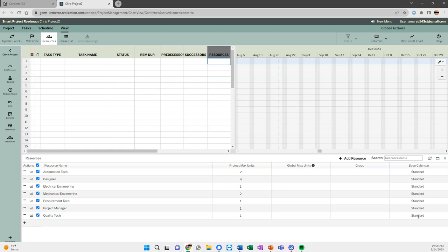There may be portions of the organization that work different calendars, so we can assign the resource capacity to different calendars if we like. But we highly advise that we keep this very simple. Operating from a single calendar just removes a lot of analysis work in the plan when we're trying to identify or determine why tasks are being scheduled the way they are. So let's keep it as simple as possible to reduce that confusion.